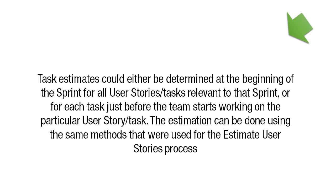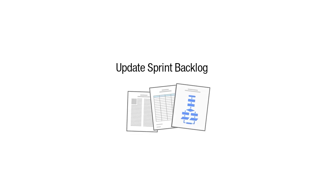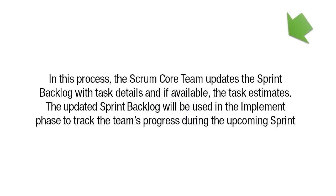The estimation can be done using the same methods that were used for the Estimate User Stories process. The last process in this phase is Update Sprint Backlog, where the Scrum Core Team updates the sprint backlog with tasks, details, and, if available, task estimates. The updated sprint backlog will be used in the Implement Phase to track the team's progress during the upcoming sprint.